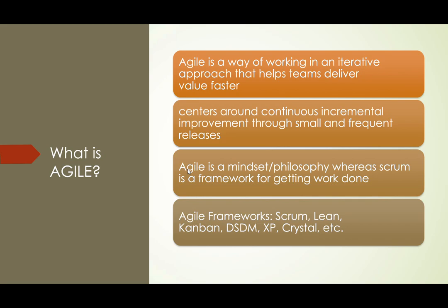And talking about the continuous improvements here, when you are releasing the functionalities of your software in the iterations, you are side by side getting feedback from the business users or the stakeholders on that functionality. Let's say in the first iteration you have developed certain functionality, you will showcase the working model of that functionality to the stakeholder at the end of that iteration, and based upon that working model, the stakeholder or the business user will provide you feedback.